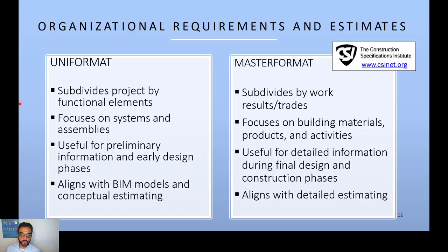But before we go into that, design requirements are communicated following industry standards. In the previous lesson when we covered design bid build, we know that design bid build follows MasterFormat, a standard for structuring and communicating the design requirements and also the cost estimation. Now we'll learn about UniFormat. So UniFormat is another way to communicate the requirements and design information and building information.